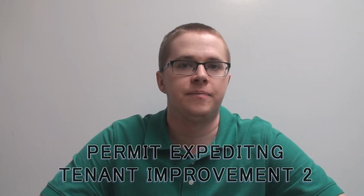This is the second video in a series talking about permit expediting for tenant improvements in the Las Vegas area. Most permit expediting processes are set up for larger projects. What happens is you pay an extra fee to both the building department and the architects and engineers who design the project so that they can all be together to work out any concerns of the building department plan reviewers.